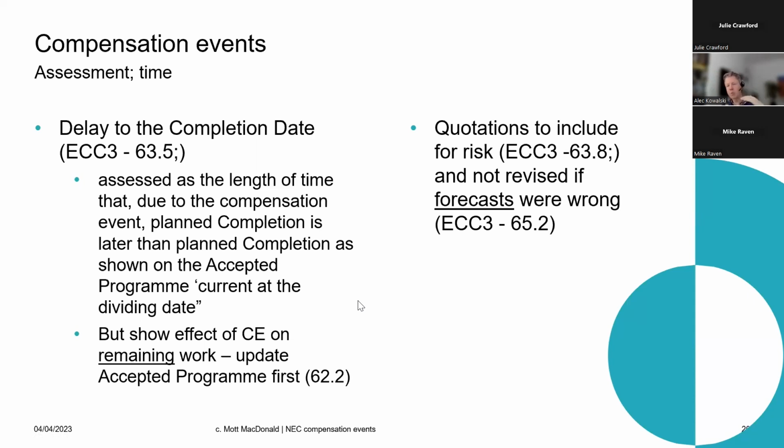Sometimes we assess it too low. We get a very, very keen price. Either we push them or we do our own assessment for some reason, and the price adjustment is very keen, and actually some risks did occur that were contractors' risks, and the cost was more than the price adjustment. And so the contractors lost out a bit there. So they're going to feel very hard done by. Don't worry, they won't be shy in letting you know that. But you need to just say, that's the way it is.